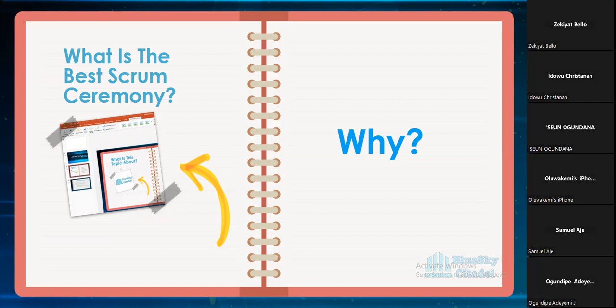Okay, thanks for the question, and I like that question. It's not compulsory, it's just a standard that I've given. Let me use myself as an example. I have small teams, I have big teams. I have a team that is just 7, I have another team of 21. Do you think for the team of 21 we end up using 4 hours for sprint planning? We don't need 4 hours. We're even using a 3 week sprint, so we're supposed to be using 6 hours by the standard.